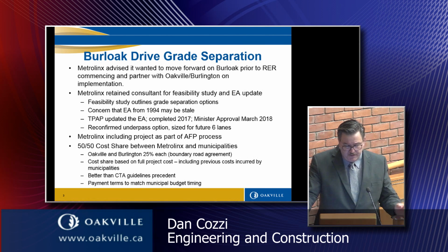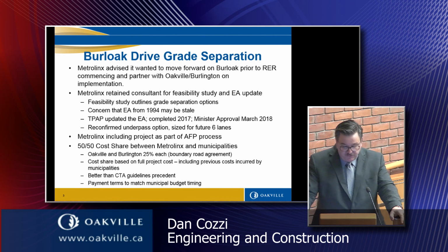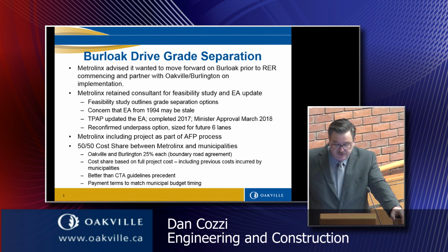The basis for a cost-sharing agreement is that it's a 50-50 cost share between Metrolinx and the municipalities. Because Burloak is a boundary road, Oakville and Burlington would therefore contribute 25% of the project cost based on the boundary road agreement.